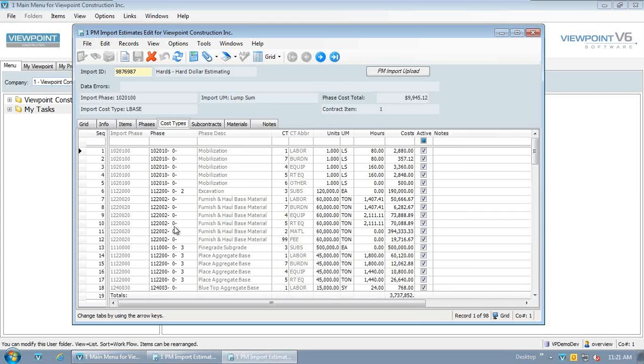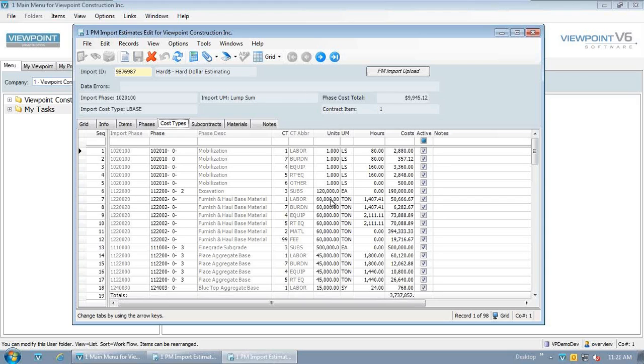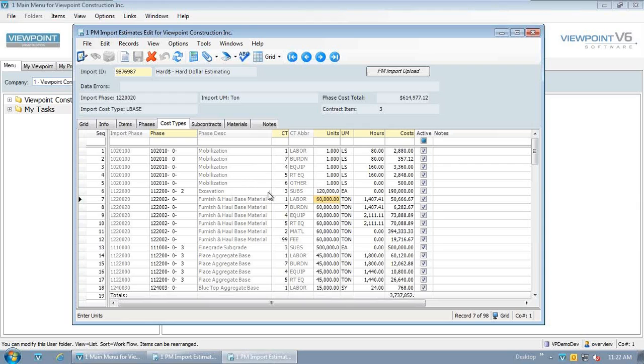The other big area is all those different cost codes or account codes that Justin assigned for us are all built in here automatically. So our breakdown for labor, our burden, our own equipment, our rented equipment will all be broken out for us. At that job cost level, we are tracking what quantities or units you're expecting, what the different rates are, as well as the cost for hours. So we'll have that amount of detail that you want to define in your estimate here set up and ready to job cost.